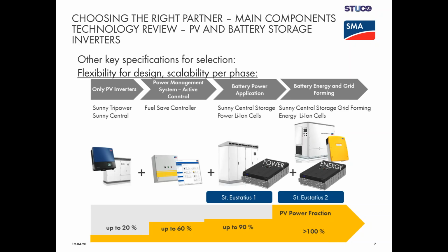We did not specify exactly the size of the PV system. This was left to the tenderers to be creative and come up with their own initiatives and expertise in determining what kind of PV panels and batteries they would apply to the system.